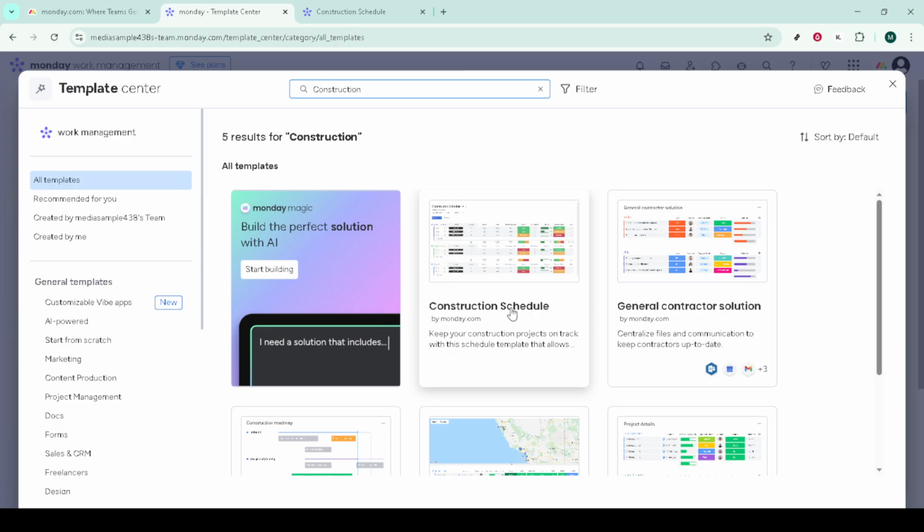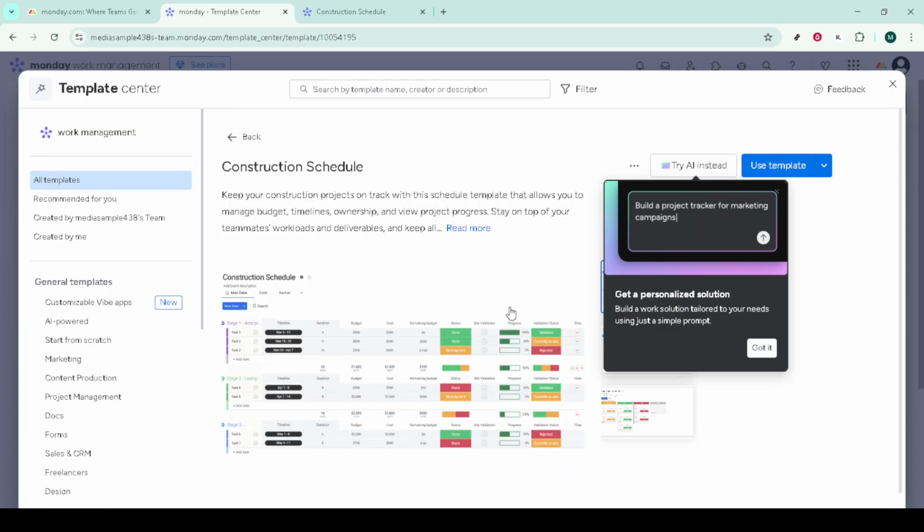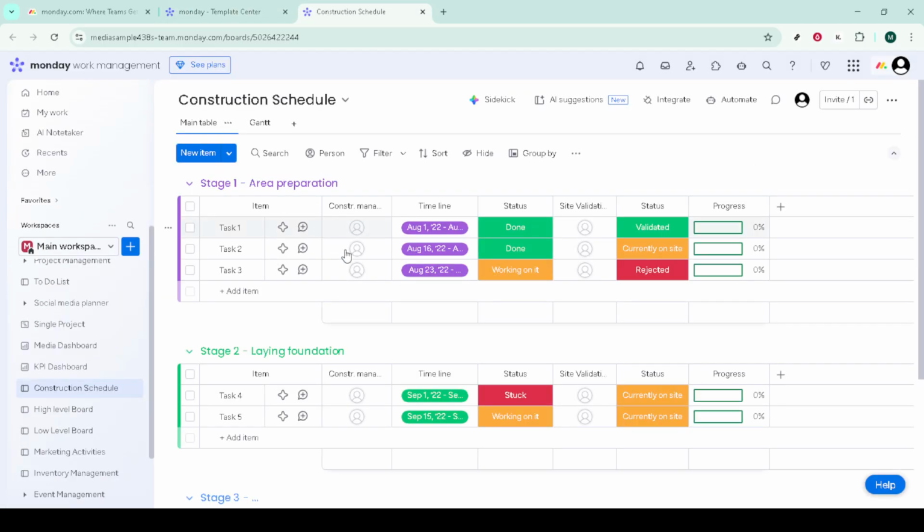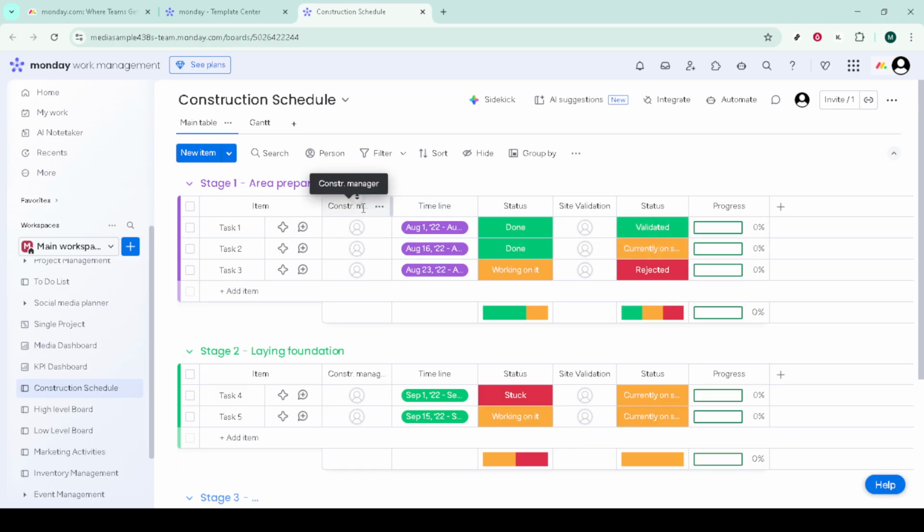Now tailor the columns to your project specifics. Include budgets to track cost exposure, add a subcontractors column to know who's responsible for each scope, and make sure your project phases are represented. Use the right column types: numbers for budgets, status for progress, people for ownership, and drop downs or text for scopes or trades, so the data is both organized and actionable.